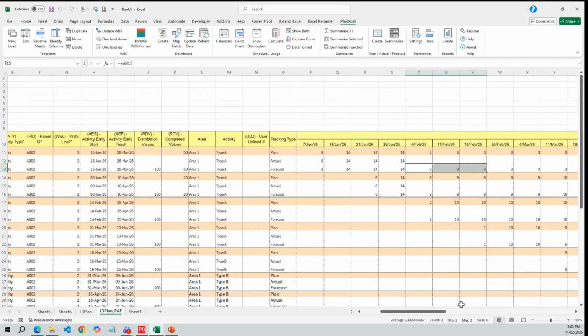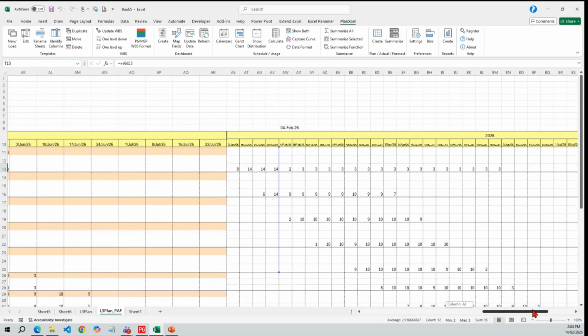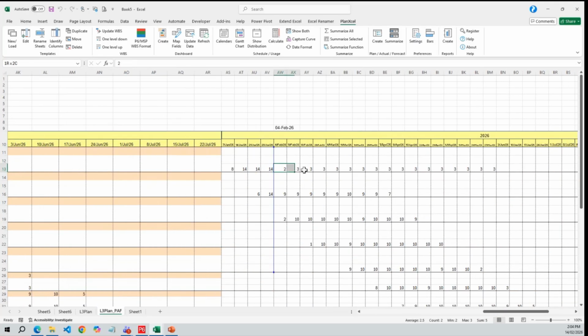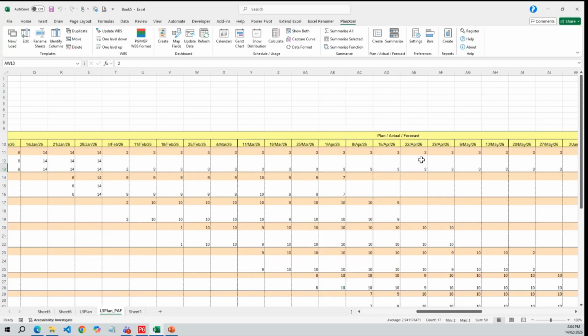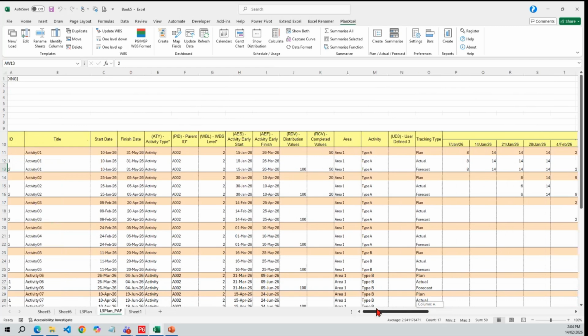And from there onwards, whatever the plan was that we set is now the forecast itself. This is now fixed. We cannot change this now. And whatever new things happen, it will happen on this. And based on these new updates, it will start reflecting on your forecast here. This way, we have set the targets.